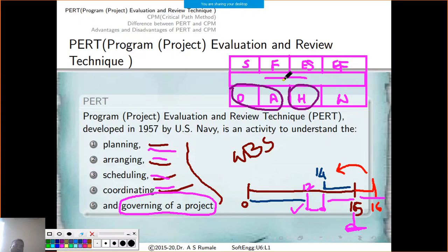But if you do not stick within the boundaries of this, what we call the worst case, then you start losing money in the particular project, and this is what PERT means. Okay, so this is a simple scenario, and every such activity may get connected with each other. Sometimes in a project you get two or three activities. Suppose one activity requires 2 months, another activity requires 3 months, but those activities can be done in parallel. Then these two activities together require only 3 months, because whichever activity is lengthier determines the time required.